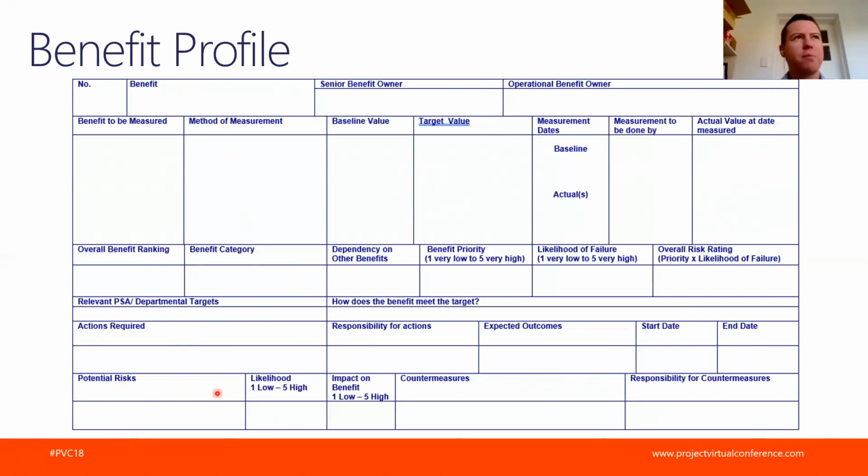Some of the really interesting figures here as well are the risks. We're talking about risk and benefit because you can have some likelihood of not achieving your benefit, right? So that's really important to track as well. The ones which are really low are the ones to focus on, depending on their value, obviously. But the ones which are high risk, you will want to track and be sure that you are still realizing these benefits. Otherwise, you have to weight your benefit value.